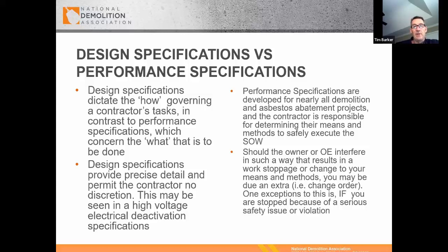Oftentimes our company has had our engineers designing those specifications. They're very detailed specifications telling the contractors exactly what products to use and how things are to be constructed and put together. Now, what's great as a demolition contractor is you don't see design specifications that often. What you're working with and what you're using, and this performance specification, you decide how the work is going to be executed. You decide your means and methods. So it's dramatically different than the very detailed design specification approaches.